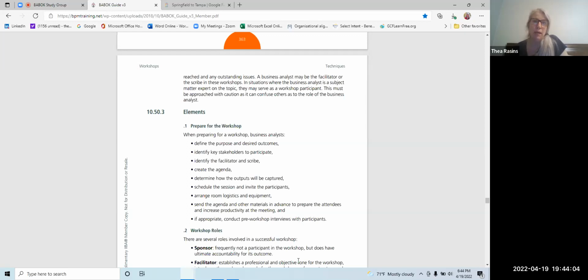If you just send them a packet, they're going to wait until they arrive to look at your packet. Send them the packet and say, on page 6, if you'll read through the packet, we have a questionnaire that we would like for you to return to us before the workshop so that we can include your considerations or your concerns or whatever. But give them a reason to read through it and give you feedback before the workshop begins. If you don't do that, you're going to get people that just came because they had to, or just came because they wanted two days in wherever it is, San Francisco.